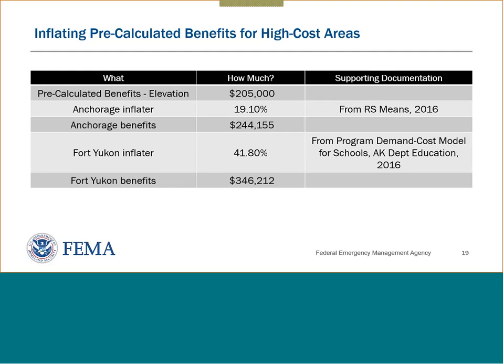And so why, Mark, are you picking Anchorage versus Fairbanks, which is much closer? Well, the second step that we're using, which is a cost model that's developed by the Alaska Department of Education, uses Anchorage as the 100% cost level for Alaska.